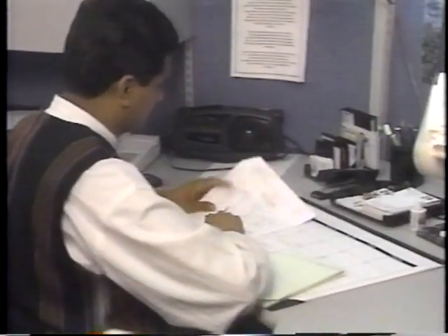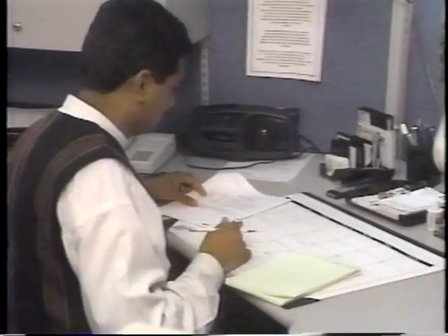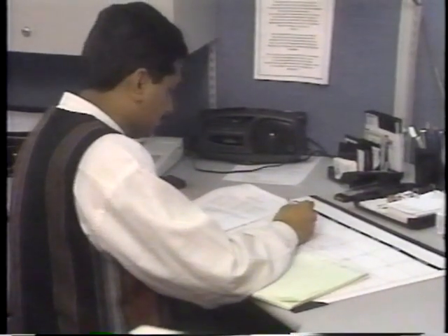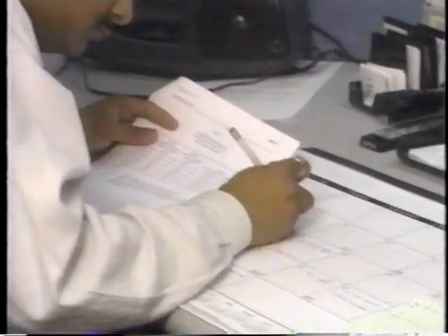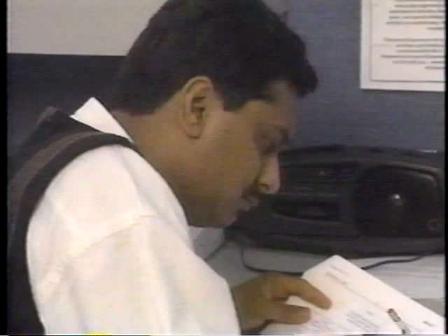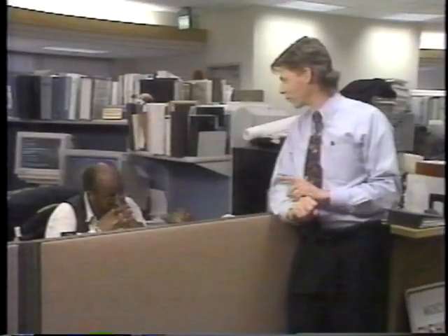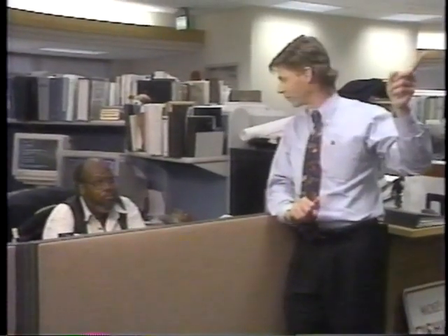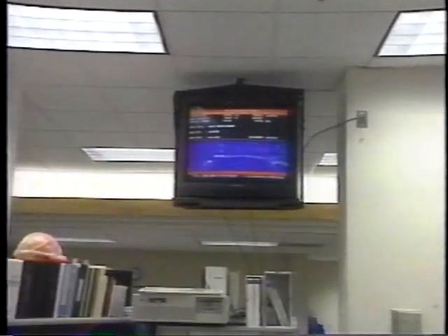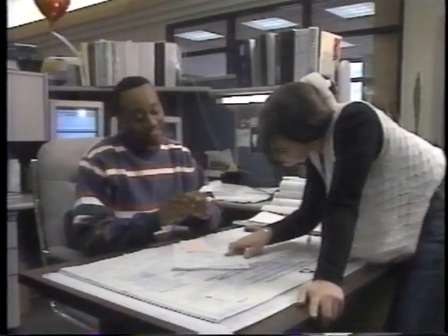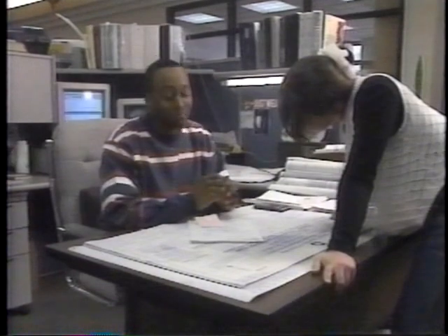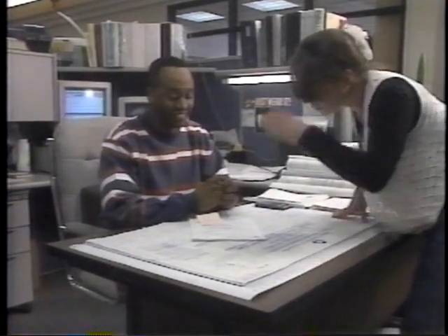The objective of a manpower distribution procedure is to estimate the manpower needs for each month. Planned manpower is distributed for each contract. It should be distributed by monthly time periods. Manpower should always be distributed over the length of a contract.